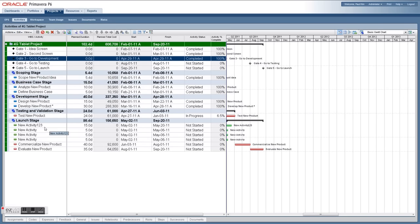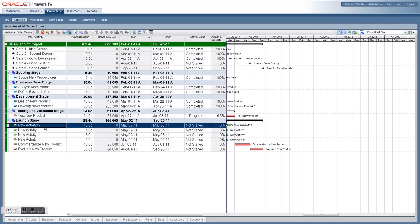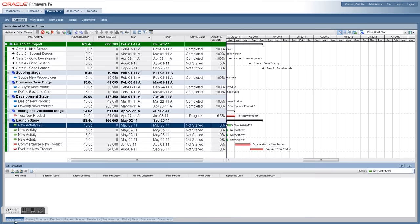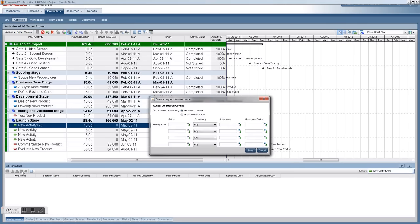Now, building your schedule — you've set durations, and now you're assigning resources. This is an example of bottom-up planning: selecting an activity and choosing either a role, resource, or searching and requesting a resource as shown.